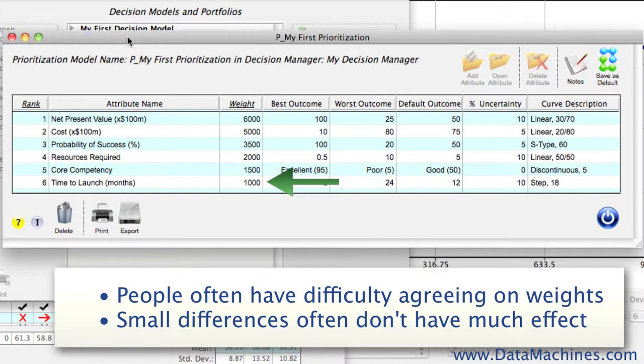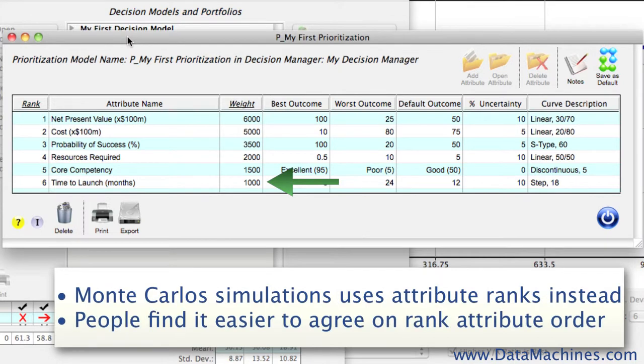Trying to determine and agree upon a set of weights can be very difficult for a group of people, and oftentimes the discussions are not even impactful in that the differences in the weights wouldn't really change the overall project rankings. This can be seen by doing sensitivity testing, where you study the changes in project rankings by varying one attribute at a time, but that is very time consuming and very complicated for large portfolios.